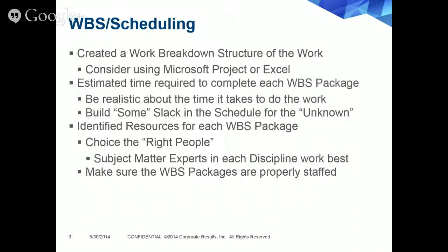Okay, so the work breakdown structure and scheduling. Like I said earlier, this is one of the most important parts of the project plan, if not the most important part. So we typically recommend really mapping this out and spending some time on it before digging into the project plan itself. We recommend using Microsoft Project. That can give you a good basis for the project plan in terms of how things are laid out and the packages themselves, or it can also be done within Excel.